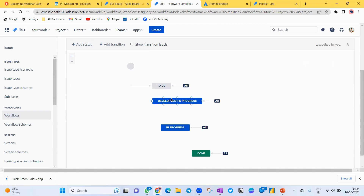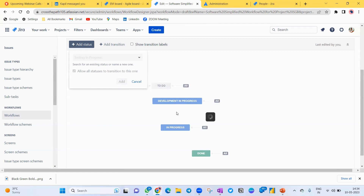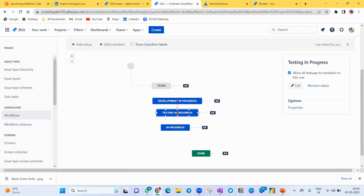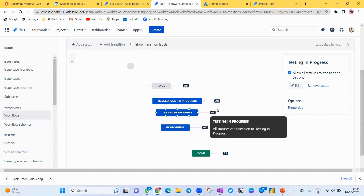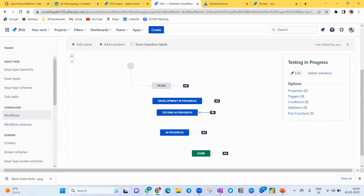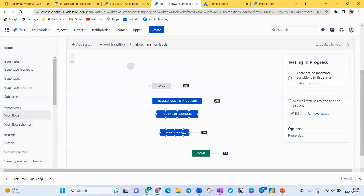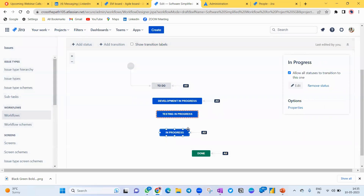Now I've created To Do and Development In Progress. Next, I want a Testing In Progress column as well. Create it and again select 'All Stages'. The reason I recommend 'All' is that it makes life easier for the Scrum Master and the team — people can move a Jira task or story from any stage to any other stage. If you make a very complex workflow, it becomes very difficult to manage.